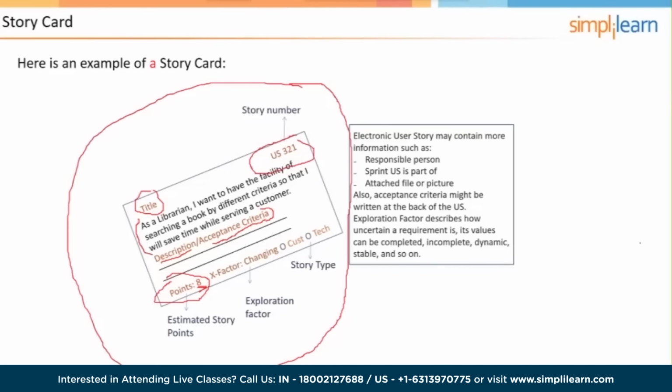It's not listed here, but there's probably going to be a value point assignment. This is where the product owner determines in a relative way the value of the stories. Just like we were doing in planning poker, the product owner might say, well, this story is twice as valuable as this other one, comparing them together. And these value points are what's used to prioritize the user stories. That's supposed to be a V, as in value points.